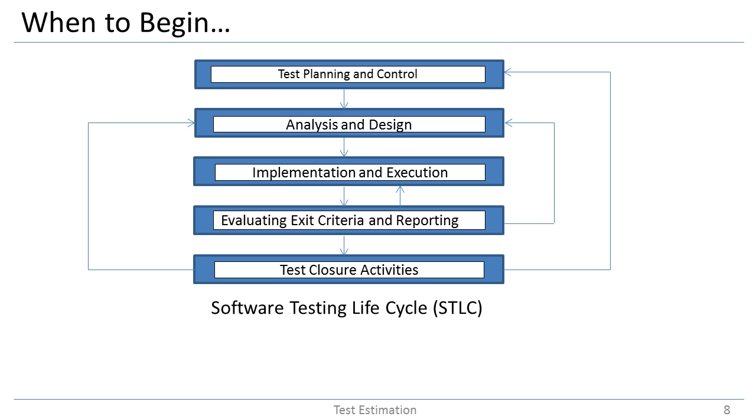Test closure activity. Once software is fully tested and confidence to go ahead with the software is provided by the testing team, the software is made available in the production environment. The test closure activities begin after testing sign-off. The post-testing activities are meant to consolidate experience, testware, facts, and numbers, like relinquishing the test environment, archiving the test cases, consolidating and updating the corresponding regression test cases, evaluating how the testing went, and learning lessons for future projects. During project closure, any learning is captured to ensure that challenges are avoided and successes are repeated.